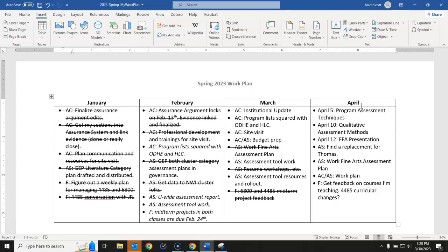So when does that thesis defense take place? When do you have to do that presentation? Before that, you need time to rehearse. Before that, you need time to write the thing up. And what are all the steps leading up to that final thing? So you'll have way out here whatever month you want to graduate, defend thesis, attend commencement, all that stuff. And leading up to that, what are all the steps that need to take place, and how long do you imagine those steps taking? So this is one option for putting together a timeline for your project.